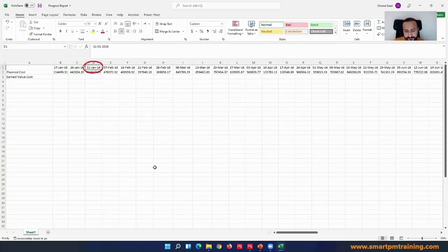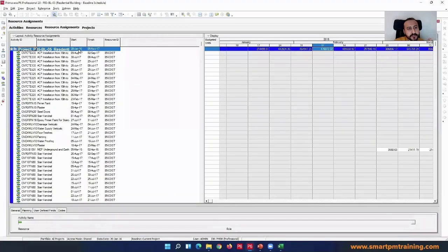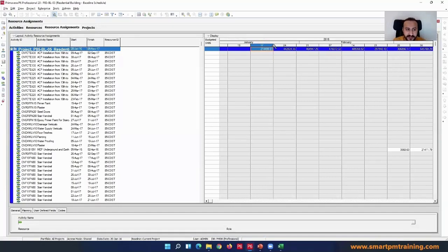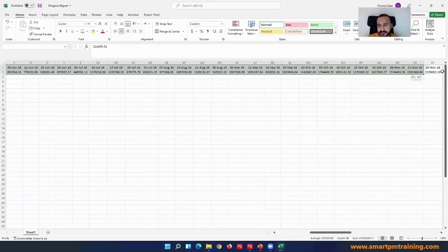I will give you another proof of what I mean. My project start, as we said before, is 20th of January 2016. How come I can have the planned cost on 17th of January, like 3 days before the project start? It is not wrong, but this is Primavera's way of reporting the resource assignments. Nothing is wrong with that, but we need to twist it a little bit to work for us. So that's actually for all values that will start from 20th of January. So what I need to do is take everything here and copy.